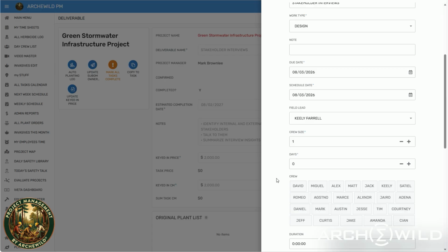So what I recommend is to just set this up as a 1-day task, so that you can more easily copy it later into another task, right? It's unlikely you'll have like 3 contiguous days of client interviews. Most likely you'll have 1 or 2 or 3 on a day, and maybe 1 or 2 or 3 on another day. All right, so we'll just assign you to that,